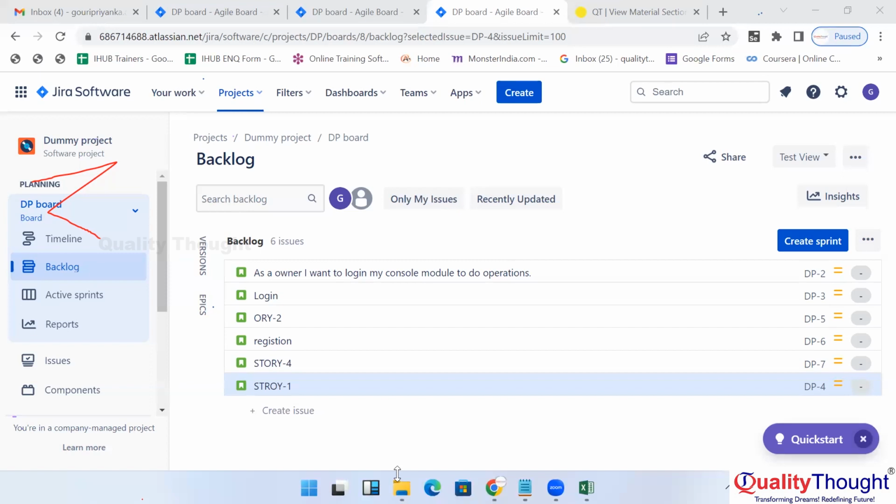So here, what do we have to do if you are facing any issues? When you gave the commitment, at that time you thought you could do it. But unfortunately, for 2 or 3 days you are not available. So now your work is impacted and you are unable to complete the task. Then immediately you have to inform the Scrum Master. This is the problem, I'm unable to complete. Can you please change the scope, or can you please add one more resource for me, just for the time being? Or I need some help from our team members within the internal team. Like this, we have to go with an alternative solution to complete the task.